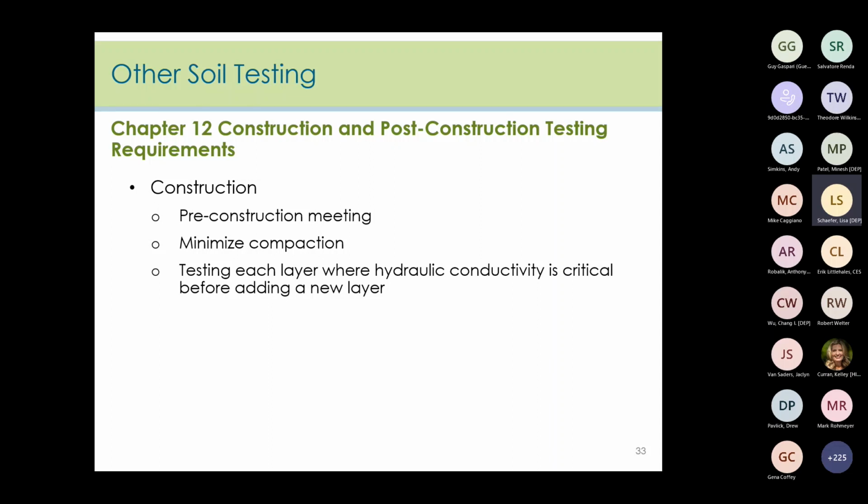Oversight includes, but is not limited to, a pre-construction meeting with the contractor, confirmation of the proper use of construction equipment, especially to minimize compaction of the infiltration area, also ensuring that earthwork does not occur within the BMP area when the soil moisture content is above the lower plastic limit, and that the specifications of any replacement soils are met, as the case may be.